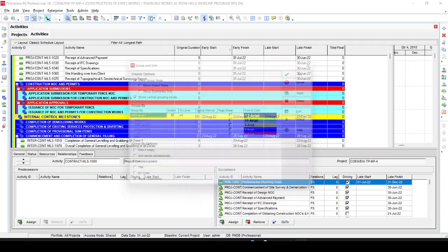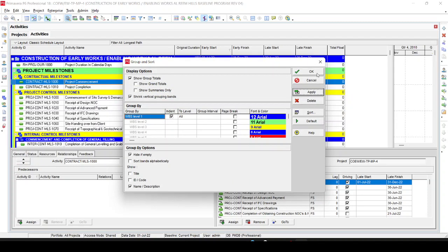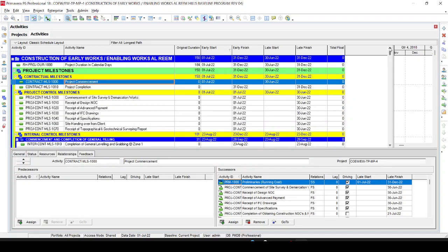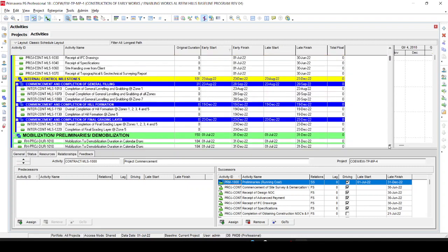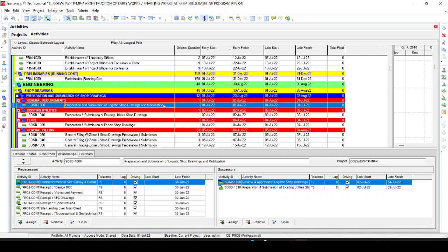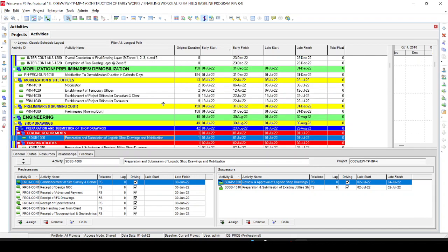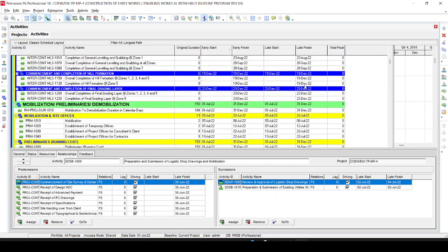After investigating the program, I find that the activity 'Preparation and Submission of the Shop Drawing' should be linked with Finish-to-Finish instead of Finish-to-Start. Let me open this activity — one moment.